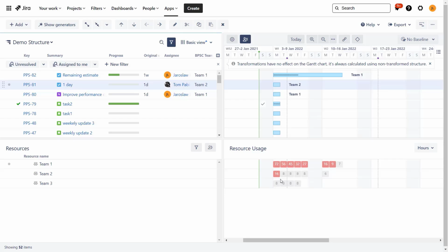So for example, if your developer's team is requiring certain hardware to do the tests, and you have a limited amount of that hardware, you can actually put this hardware into the single select dropdown and also use it for planning. So you will be selecting in this field the hardware that you're needing for the duration of the task. And you will be able to monitor over here whether this hardware is available or not.